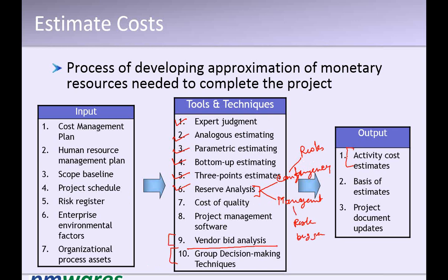We club them together and go up the WBS, and that is called bottom up estimating. First at activity level, then at WBS level, then at higher WBS levels, up to the project cost. So total project estimation can be worked out in this manner.